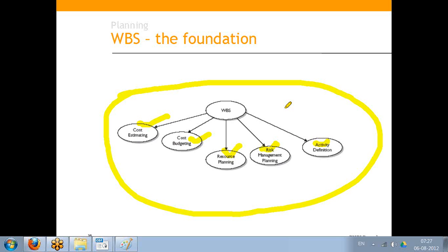So that's why once you baseline the scope, control becomes very critical, because you create the WBS based on the agreed upon scope only, and after that if the scope changes it will have a reflection on the WBS as well. So once the scope is defined, it has to be really managed through the change control boards and all those things. Otherwise your estimates will go for a toss, your schedules will go for a toss. So once the scope is baselined, it has to be controlled.